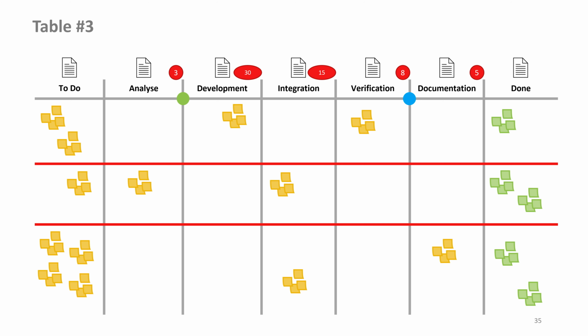With work in progress limiters, we can control how much work is done in parallel and at what speed. The flow of work has the goal of completing what we have started as quickly as possible. This is above everything else in Kanban. The faster a task is completed, the faster we can take on the next tasks.